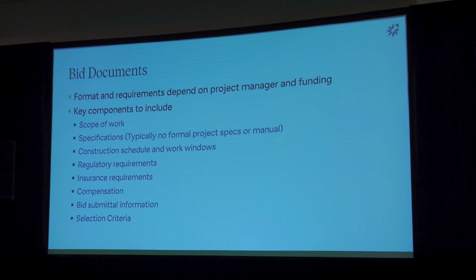I'll also mention something that came up at work at lunch about how sometimes it can be forgotten to post the bid, like get the advertisement out there. So it's good to make sure it's on the Vermont bid registry, it's sent out to anyone who's been worked with before to just make sure it's spread as wide as possible.